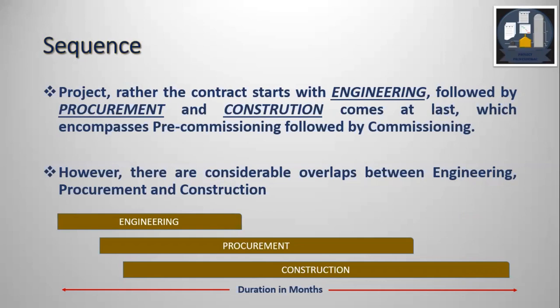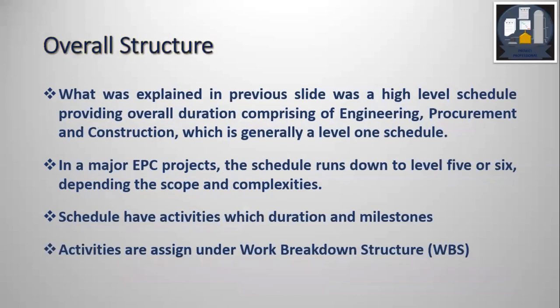This is the sequence. However, there are considerable overlaps. After Engineering starts, after some time Procurement starts — it does not wait for Engineering to complete. Then after the start of Procurement, after some time Construction starts. It does not wait for the completion of Procurement. It is very considerably overlapped.